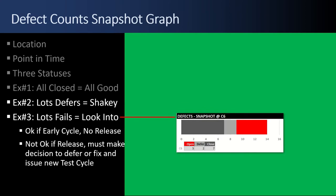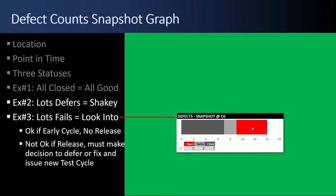Example number three, that's a lot of red. There's a lot of fails. You need to look into it. If it's an early cycle, not a big deal because you're going to find a lot of stuff in the beginning. If it's a late cycle, yeah, that might be a problem. And if it's your final cycle, no, you're going to have to do a followup cycle because that's a bunch of defects. It depends whether it's a good or a bad thing.